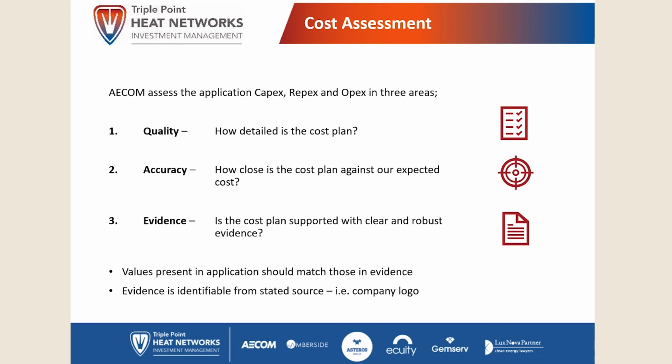Using the very simple descriptors only makes life quite difficult, because if there is a big variance, it's difficult to understand why that variance is there, because we don't have the detail to go and identify what the different costs are. Clearly, this is where the source of the costs is quite important as well.